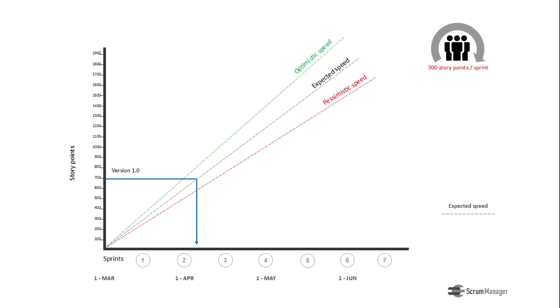This way we can project on the horizontal axis the three estimates: pessimistic, probable, and optimistic.